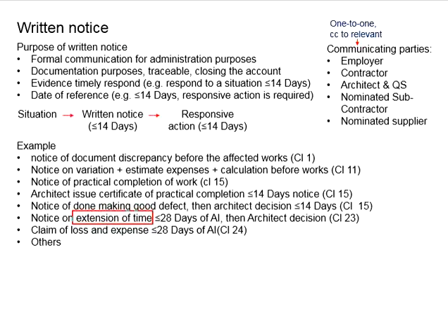Next is the notice for the extension of time, which must be submitted within 28 days of the architect's instructions. Beyond the date, you cannot apply for the extension of time. Then your completion date will be fixed. Any delay due to that particular architect's instruction will be considered non-performance on your part. Liquidated damages shall be imposed, calculated on a daily basis. Definitely you don't want that.